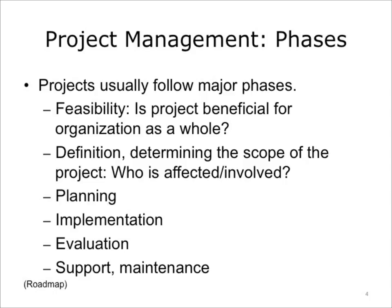A project is usually defined in phases. The number and types of phases are solely dependent on the project at hand. However, some of the more common phases include: determining feasibility — the process of determining if undertaking the project will net beneficial outcomes for the organization; definition and determining the scope of the project — who is affected, who will be involved, and what other factors are relevant; the project planning phase — developing a roadmap for project success; the project implementation phase — actually doing the work; evaluation; and support and maintenance — determining the project's net benefit and putting in place processes to ensure longevity.